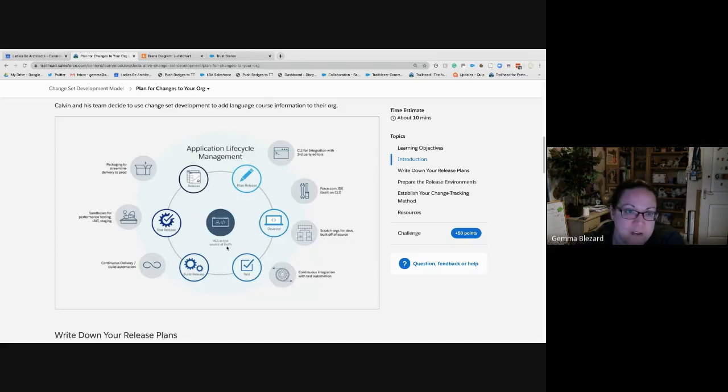So in this change set development approach, what we talk about with ALM, Application Lifecycle Management, is how we plan our release. And there are different methodologies that people can use. Some projects and environments are less changeable. Things are quite static, or they have done a lot of analysis first of all, and they said, okay, we're going to split what we want to do with Salesforce into 4 different projects. And in this project, we're going to deploy opportunities, accounts, contacts, and leads. Then in the next project, we're going to introduce CPQ, configure, price, quote, which is advanced quoting tools. Then after we've got some data in, we will then roll out to the customer service team, and we'll look at case management and Service Cloud. And that's quite a typical program where it can be quite linear.